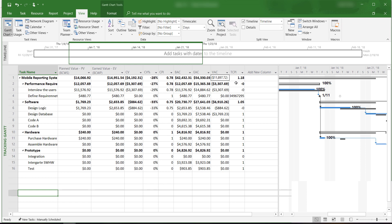We also see the TCPI on this table. It tells us we have to earn $1.18 for every remaining dollar we spent in order to stay within the budget.